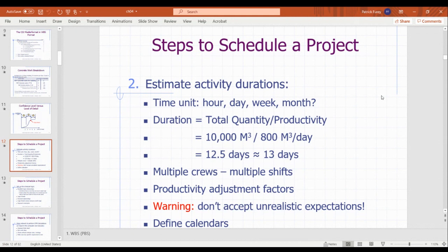Best case is you have a company history kind of thing, a spreadsheet of how many man-hours were worked on a certain kind of project. That's your best guess, because theoretically it's the same group of people doing the installation, so hopefully it shouldn't change too much. Honestly, the second time someone does it, it should be easier, it should be faster, but that's not always the case.